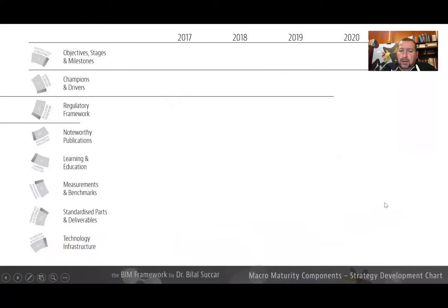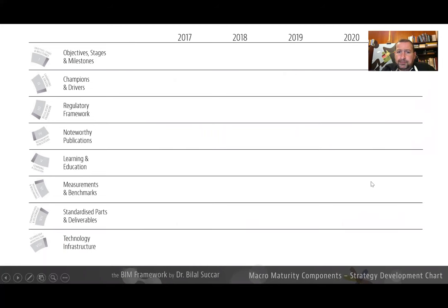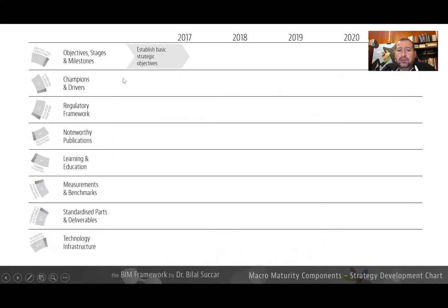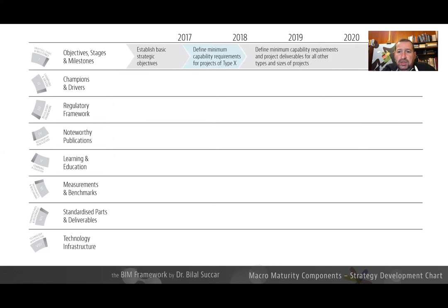Other ways of using these eight components, for example, if we replace the maturity index with time, meaning we are using these eight components on the left column, and mapping them against some kind of milestone or objective. For example, if a market would like to develop a BIM strategy, they can use these eight components and say, I want to establish basic stage objectives by 2017. By 2018, I want to define minimum capability requirements for certain types of projects, and then other minimum capability requirements for other types of projects.